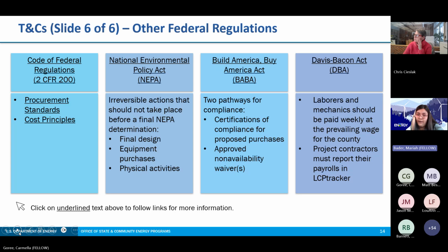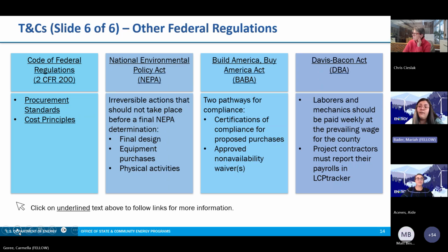And then finally, for the Davis-Bacon Act, that will kick in when construction starts, and that will be when laborers and mechanics should be paid weekly at the prevailing wage for your county. Project contractors will then report those payrolls into a system called LPC Tracker. We keep on saying that that's going to come at a later date, but it will be an important piece to the project when construction starts.